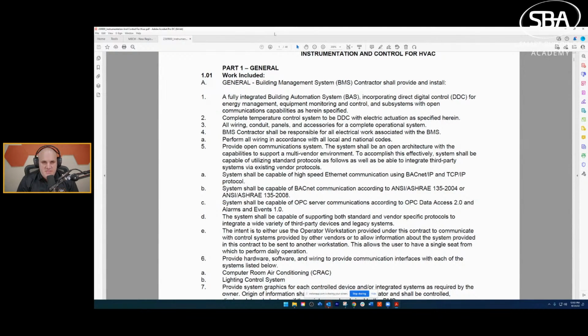What happens is you create documentation based on the owner's intent of whatever this project is. So you typically start with a site drawing, a vision, which will turn into architectural drawings, which then will turn into the mechanical, electrical, plumbing drawings.